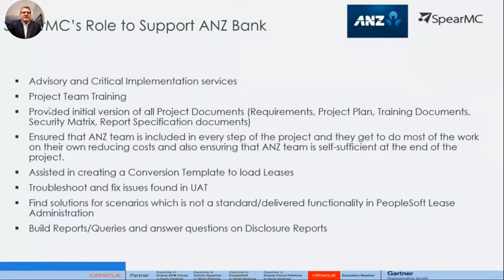When we are involved in a project such as this, that involves the implementation of a new module, a very complex, critical new module, we insist on starting our projects with training, and that's not end user training, that is project team training.